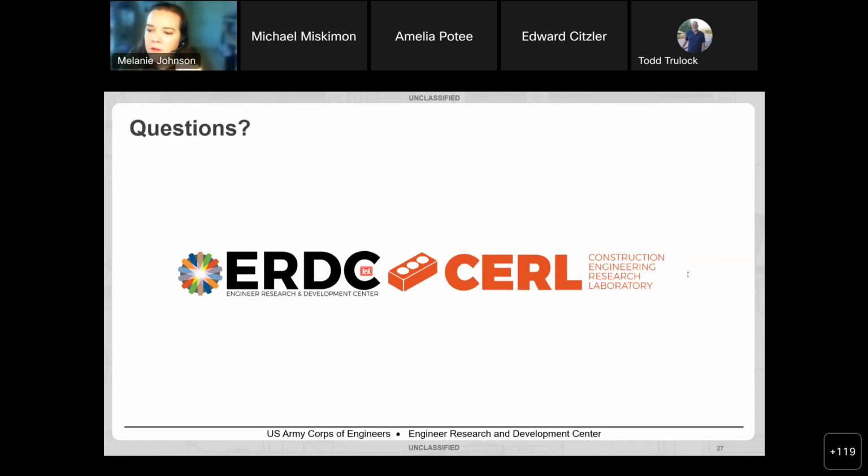So on the sole source question, the biggest sole source question we have in most of these is whether or not we can allow the privatized utility contractor to do the design and construction, which is my understanding is at this point in time, it's basically technically illegal for us to do that. So there's a lot of questions being answered at high levels in USACE and the Department of the Army about how we might work through that and whether or not we need Congress to change laws to make it possible.